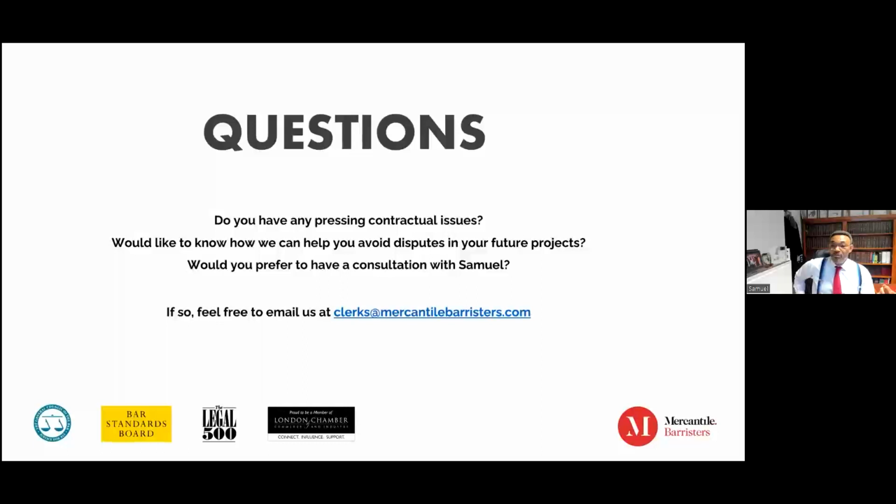So practical completion is effective indeed the day that the employer takes occupation. Legally, the contractor is entitled to 50% release of retention for practical completion on that day. So there are two inconsistencies. If the architect thinks that it's not done, then the architect must endeavor to prevent the employer from taking occupation.